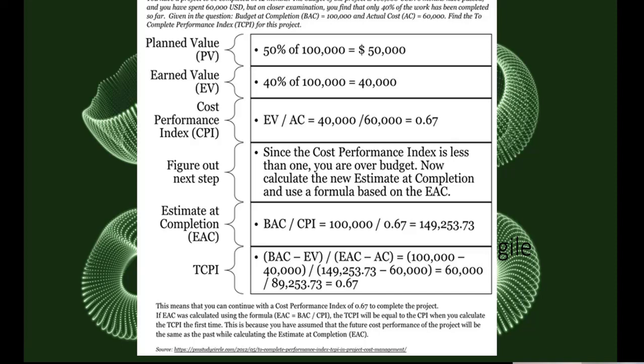For CPI and SPI, we said that if it is greater than 1, the project health condition is good, right? TCPI is the opposite of CPI and SPI. If it is less than 1, it is a good condition, but if it is greater than 1, it's a bad condition. Again, remember that for CPI and SPI, greater than 1 is good condition, but TCPI is opposite: less than 1 is good condition.